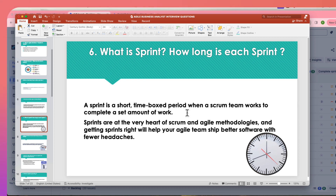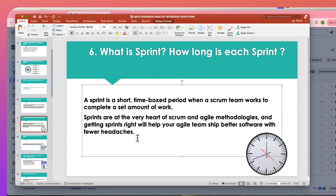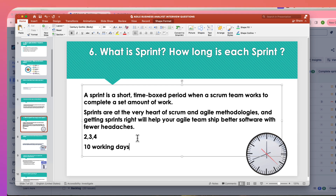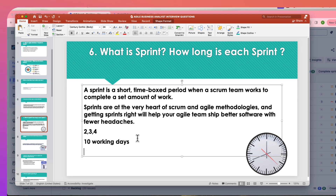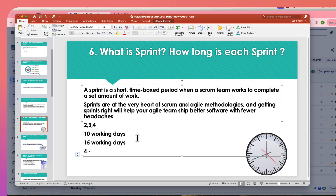The next question is: what is a sprint and how long is each sprint? A sprint is the amount of time required for developers, testers, and business analysts to complete their work. You can have a two-week sprint (10 working days), a three-week sprint (15 working days), or a four-week sprint (20 working days), assuming no holidays.